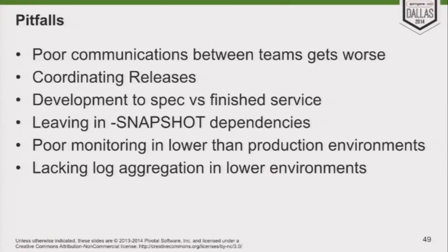We were done with the development, but we didn't do a good job communicating to our QAs and their QAs that we have to expedite this to the top of your QA stack so it can be tested and move up. We just didn't do a good job coordinating across that.